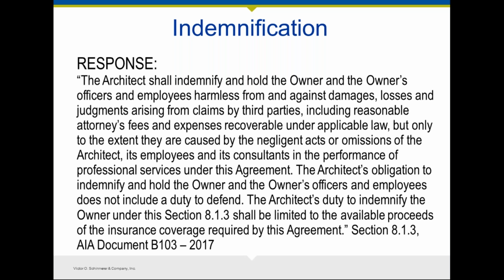So one thing that I've seen increasingly over the past 4 or 5 years is clients willing to separate out your professional liability indemnity obligations and saying that, with respect to claims insured only under the professional liability policy, it only applies to such claims that result from your negligence in the performance of professional services, and your defense obligation will be the reimbursement of your client's reasonable legal expenses in defending against an allegation of harm once that failure is determined.